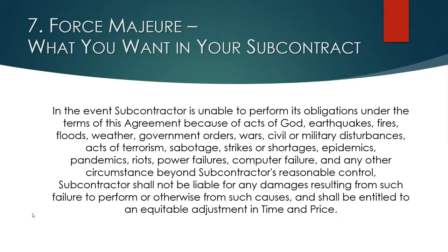I also point out that this language includes a waiver of performance, also a waiver of damage. I think it's better to spell out both. Not only can you stop performance because of one of these events, but any damages that arise due to your halted performance, you're not responsible for.